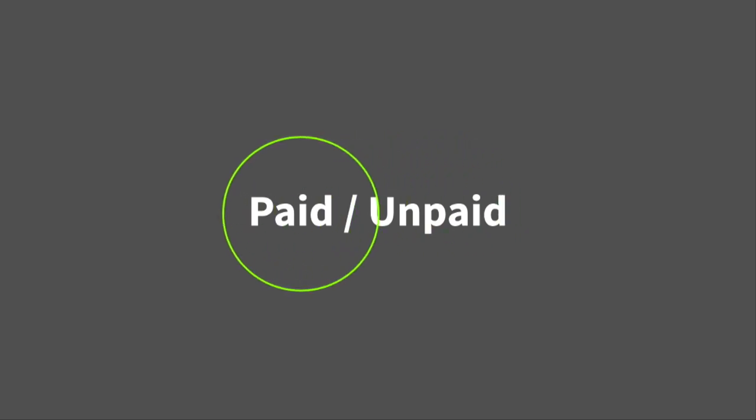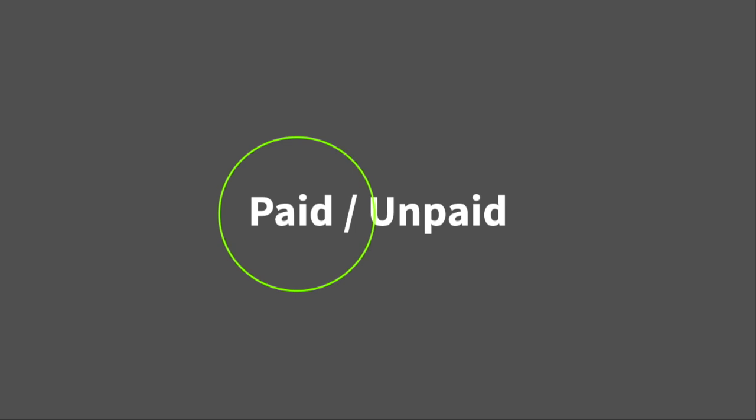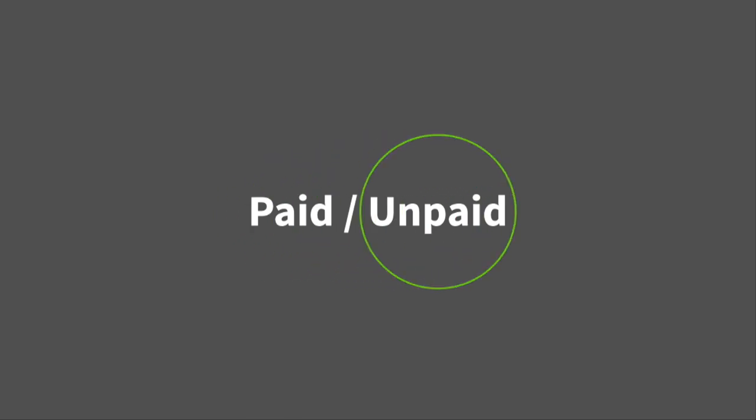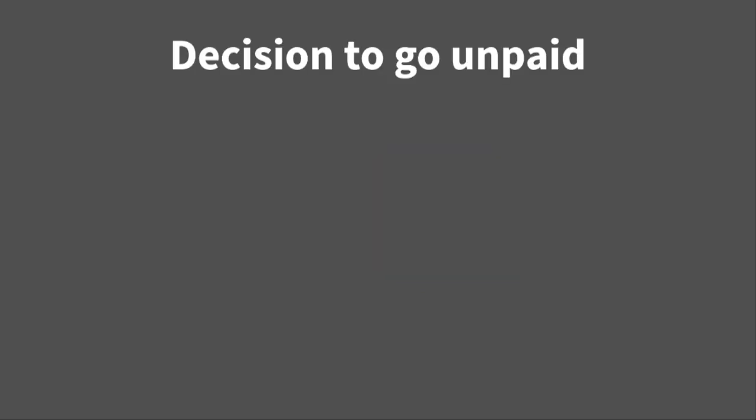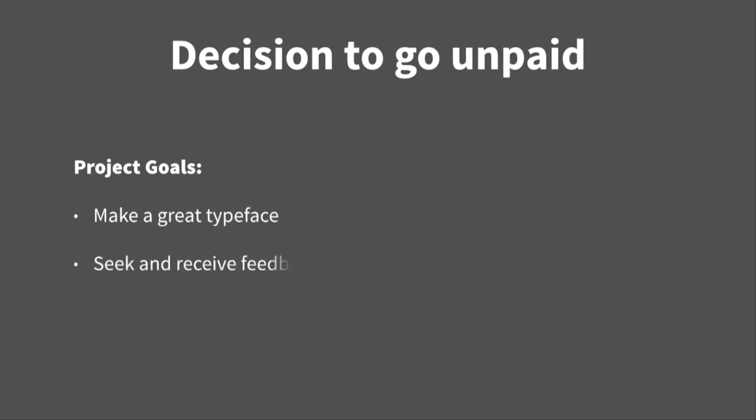So, the first thing we had to think about when we went to release it is it's going to be paid or unpaid release. And we kind of waffled back and forth on this, lots of discussions. In the end, though, we decided to go with unpaid. So, the reason for this is that, well, firstly, this method best aligned with our goals. So, the project goals in this case were, firstly, to make a great typeface. To make sure we're seeking, receiving lots of feedback. And to have a full, great user experience from start to finish. Especially the second point, seeking and receiving feedback. We thought in this case, since that was one of our biggest goals, we'd get better results if we went unpaid.